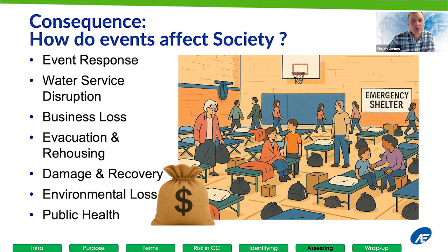It lends itself also to making decisions. So if we have $1 million risk, then I'm clear that spending $500,000 to mitigate that risk is a good deal. If I have $1 million risk, but spending $10 million to mitigate that risk, hey, that seems pretty expensive. So I'm beginning to make a judgment call. Because I'm expressing risk in dollar terms, I can begin to make a judgment call about, well, what's it worth to evaluate that risk? Is it costing us more as society to mitigate the risk than it is to accept that risk?